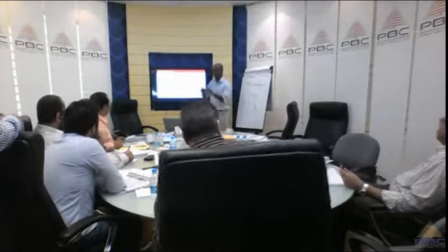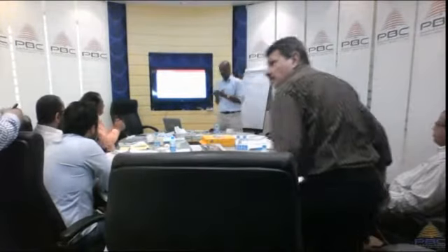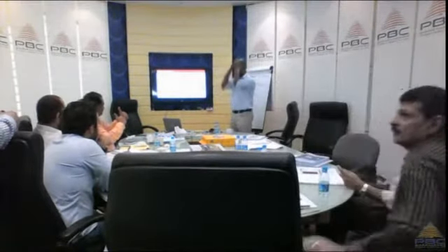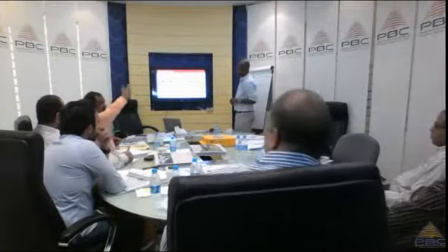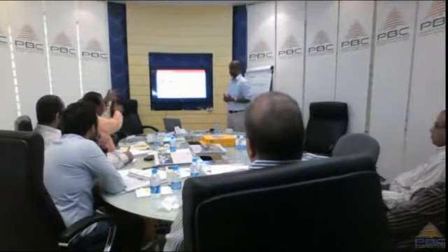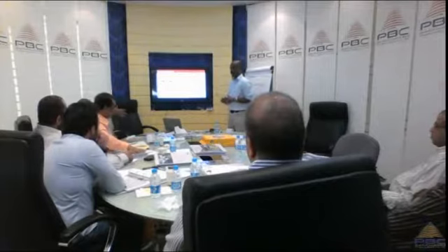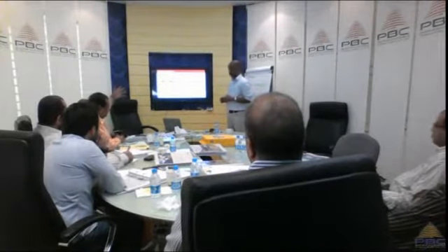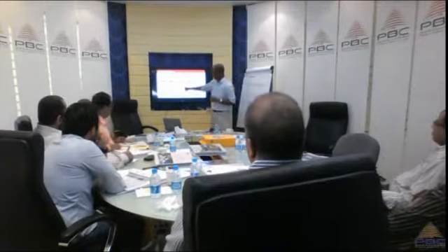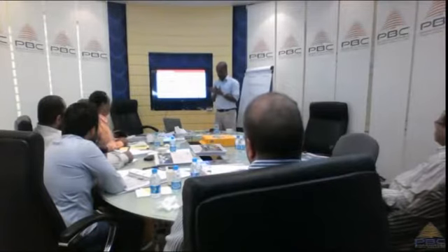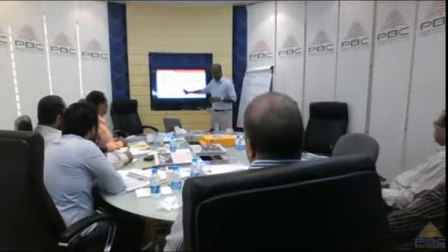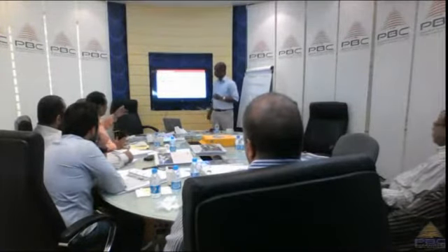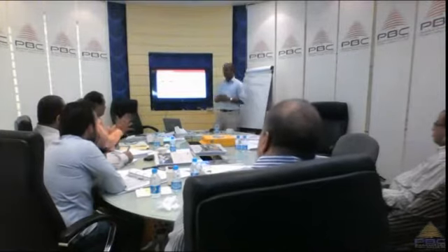Now there's another thing that happens, which is leads and lags. How do we use these? Some activities have more lead. For example, say building the external work. Right. External work is being done, and at the same time we can do the landscaping work outside. It will not affect the schedule; it will save time. Exactly. So you use these techniques to respond to management requests to compress the schedule. If they say, well, that's fine, but can you please speed things up a little bit, you can play with your leads and lags. This plays a big role in compressing the schedule.